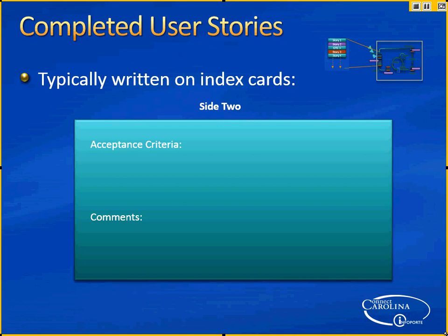But you need to add something else before you put it into the sprint, like anything else: what are the acceptance criteria? This is a requirement. What's the minimum requirement for it to be accepted? And then just a space for comments. It could evolve through the sprint, right? You learn something and then you write it down. So it's a documentation method.